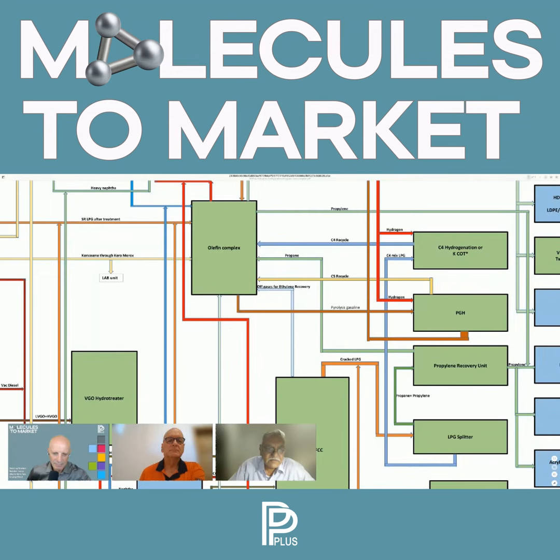The third part is, when we are looking into the plant, I have to look into the complexity of implementation. That means what is the magnitude of the work which is involved? What is the kind of equipment and hardware base that I will require? And where exactly, broadly, I'm going to do sourcing. It's a matter of a little bit more detail, of course, but I must have a broad sense because my main intention at this particular stage would be to work an order of magnitude cost estimate. So I need to know where exactly I'm going to directionally source.